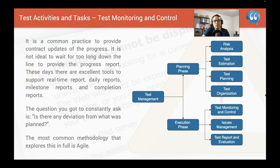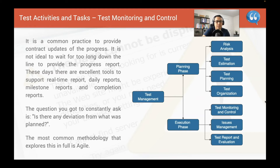Test monitoring and control - you have the planning phase and then the execution phase. In the planning phase you capture the risk analysis, test estimation, test planning, and test organization. In the execution phase you do the test monitoring and control, issue management - how you manage your bugs - and then the test reporting and evaluation: have I tested what I planned to test? It also depends on the methodology - waterfall, V-model, or agile - it might be slightly different.